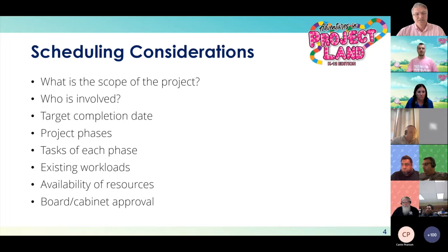And then also just evaluating any of your approvals that need to take place during the process as well. You may have board approval that you'll need to seek, approval from your cabinet members. If it's an E-rate funded project, for those of you that have gone through that process, that is a rather lengthy and complicated process. So just making sure that you're allowing enough time for that to happen as well.